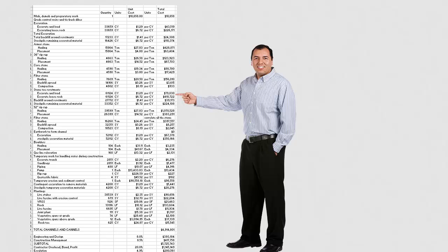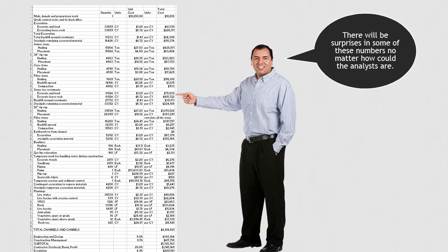A product or project may have hundreds of individual parts, and the engineers and analysts working on those parts may be excellent at their jobs. Given the uncertainty in the world, an engineer or analyst who could achieve 95% certainty is doing a heck of a job, but it only takes a few sub-spec elements to make the entire product or project sub-spec.